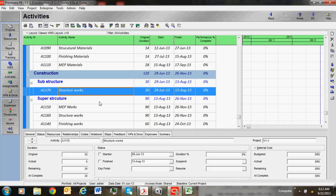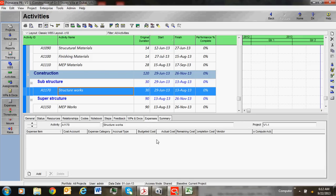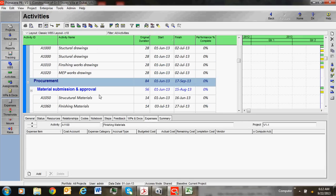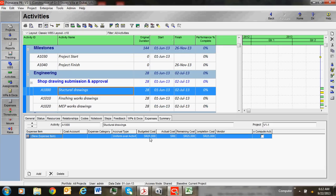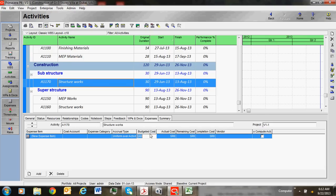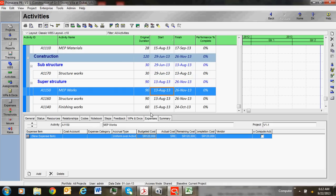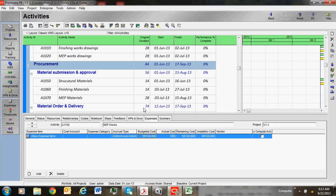In some projects we cannot see a proper tracking method for this cost. In that case we have to choose another option - Expenses. In Expenses we add the total projected cost. You can just add the total particular cost for each activity. In this method we can add our total cost this way for all activities. This is the type of assigning the total cost to our activities.